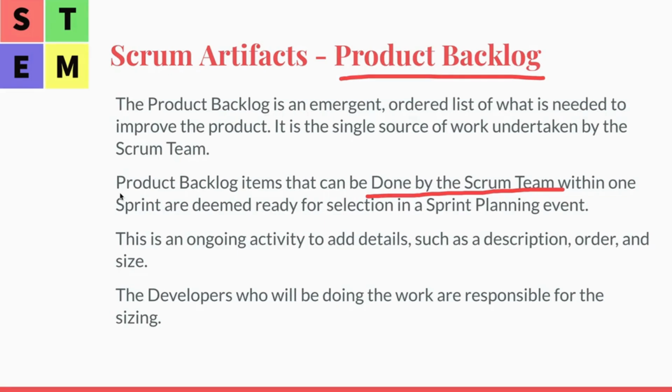Okay, then after the value of effort is evaluated, and the product backlog item is detailed enough that every team member knows how to do it, then it could be selected and added to the sprint. Okay,